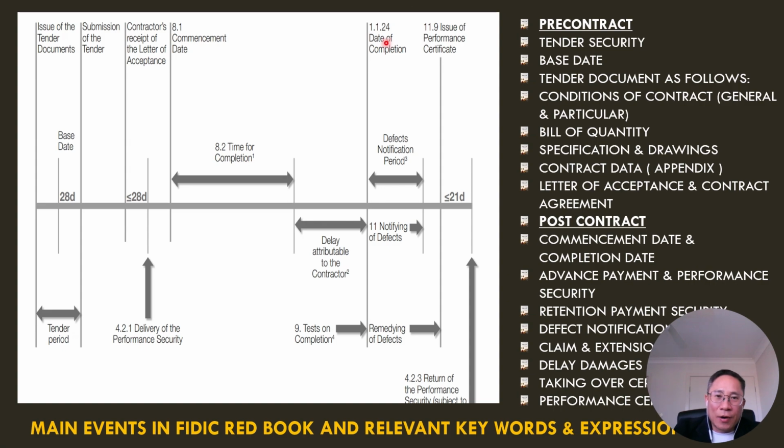And from the taking over certificate day, we will start a very important period called the defect notification period. That means after the contractors complete construction of a project, they will be responsible for rectifying any defect that occurs during the defect notification period.